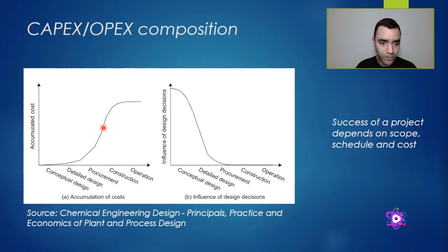So you keep increasing the cost accumulation until you get into the commissioning, startup, and operations. So based on that, if you build your cost estimation, and most often to the board or to the project manager, you need to have also what is the cost in the timeline.